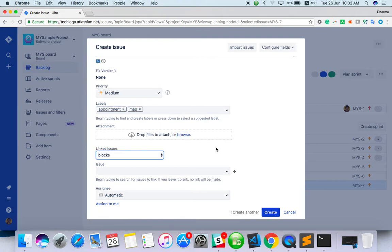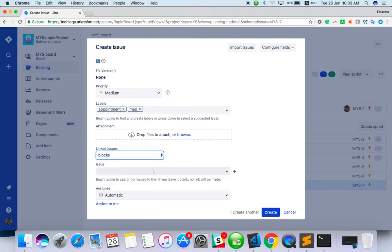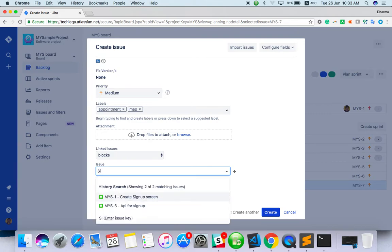You can add some files here if anything is blocked. For example, there should be a design created, then only you can integrate the Google map. Something like that, you can block the issue. Name the issue. If you start typing something it will come. Start typing two characters, you will get the issue list.